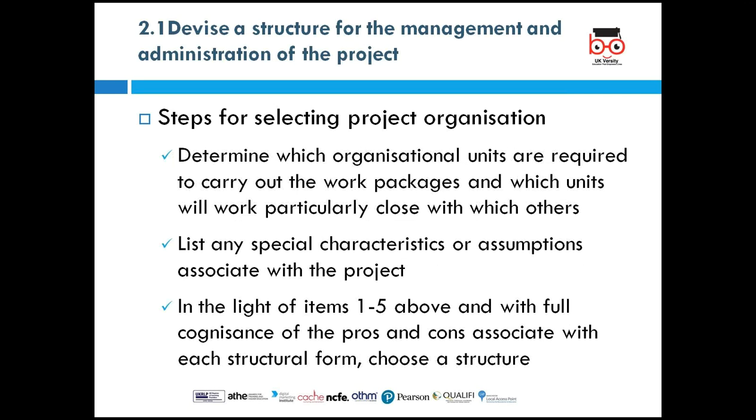Apart from that, you determine which organizational units are required to carry out the work package and which unit will work particularly close with which others. Determine which organizational units are required to carry out the work package and which unit will work particularly close with each other. Let me explain that.